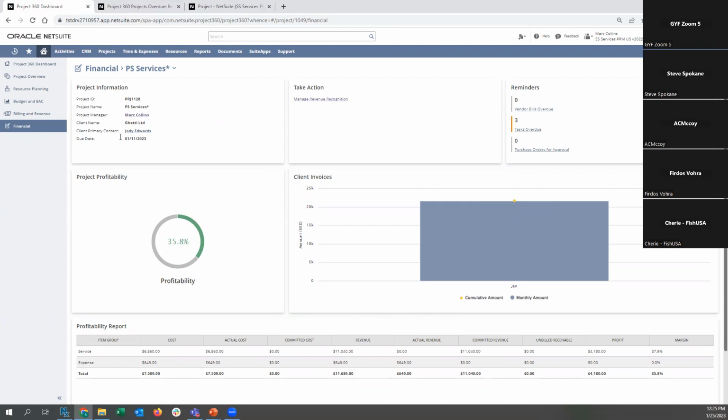Steve, do you want to add anything? Yeah, like with the service and expense, if you aren't actually matching that, it will just give you an additional line that literally says unmatched. And that's where the actuals would end up going. So it can still get to the project, it might just not get down to your specific budget line if you don't take all those steps.